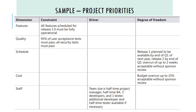Staff is the fifth dimension. We can see that schedule and cost are not very strict constraints — we have not been given a lot of degree of freedom on schedule and cost. For budget, a cost overrun of up to 15% is acceptable without sponsor review.